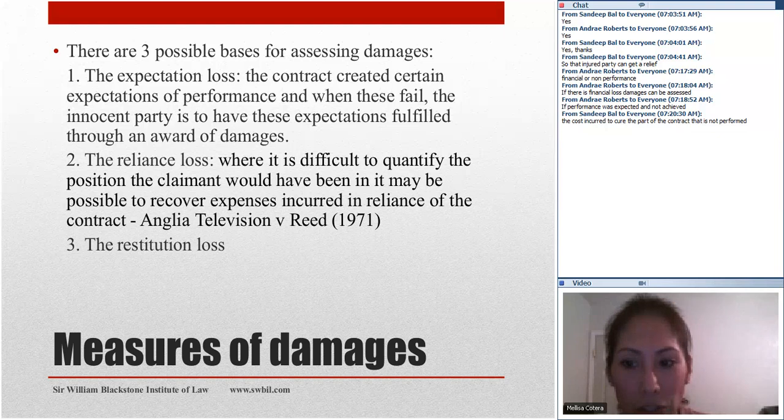Later, they discovered serious defects in the house, which cost them around £34,000. At the trial of the action, the value of the house in its defective condition was established to be £162,500. The judge awarded Mr. and Mrs. Watts £33,961 being the cost of repairs, rather than £15,000 being the difference between the price paid for the house and the price that would have been paid for the house had the defect been known. In addition, the judge awarded Mr. and Mrs. Watts £4,000 each for distress and inconvenience.